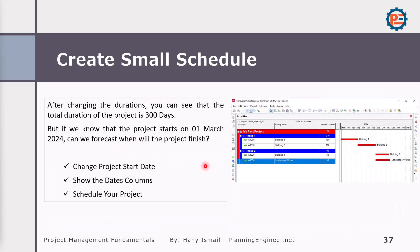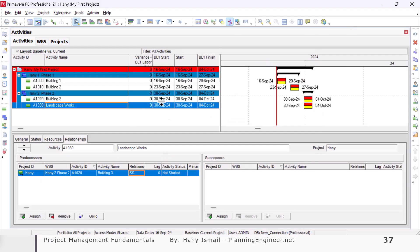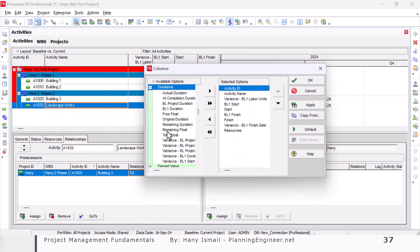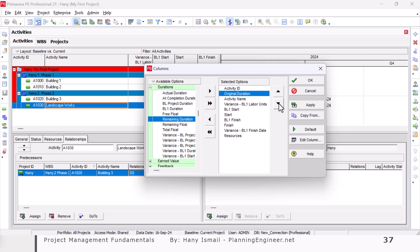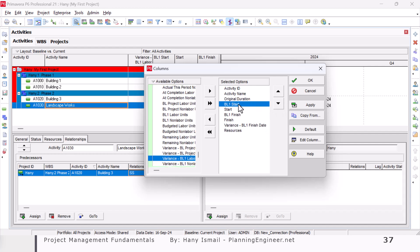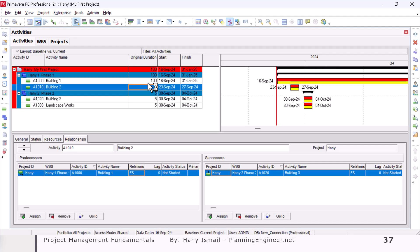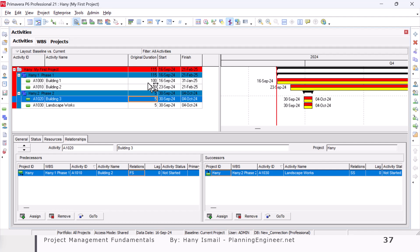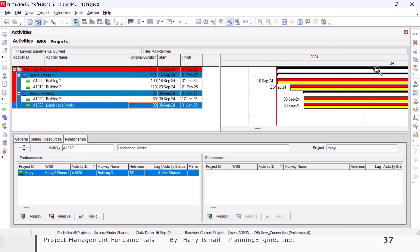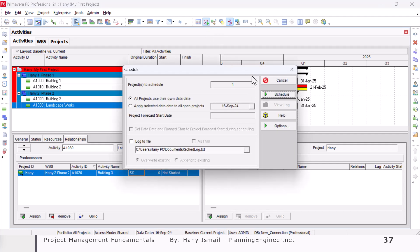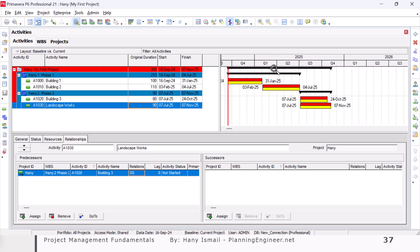Now let's change the durations in our project. To change duration, first show the duration column by right-clicking and going to Columns — it's called Original Duration here. Double-click to add it and remove any columns you don't need, then click Apply. Now I'll set Building One to 100, Building Two to 110, Building Three to 80, and Landscape to 90. Use the magnifier to adjust the view, then run the schedule to see it properly.